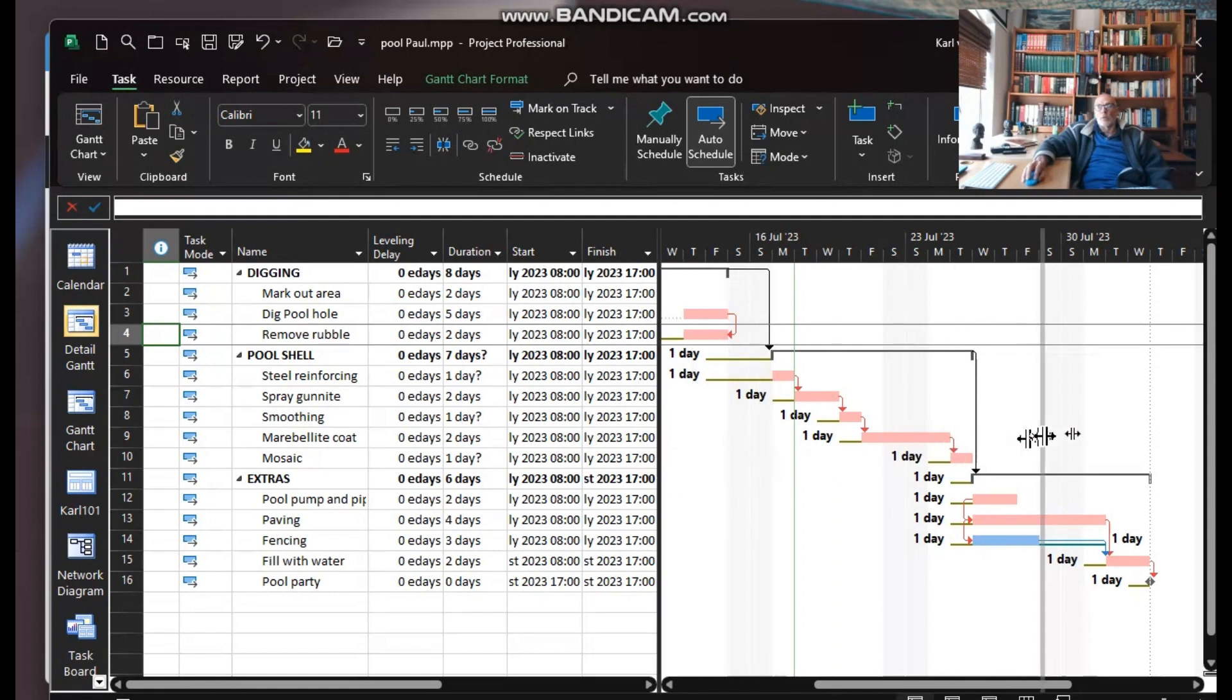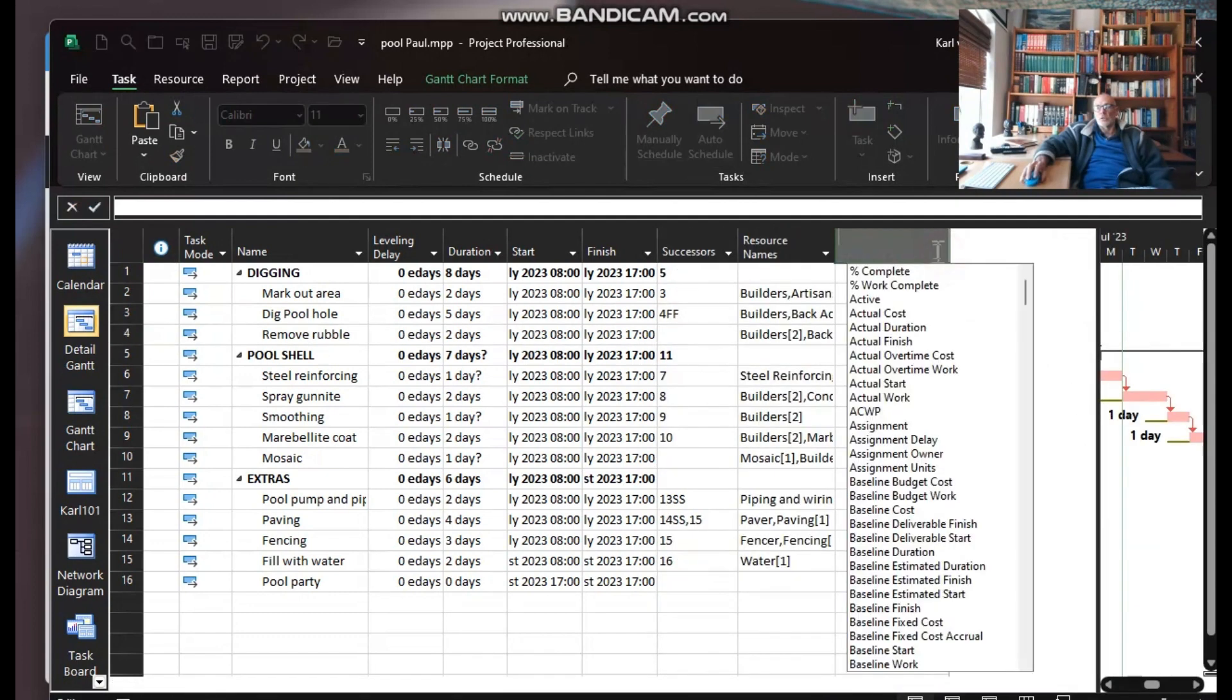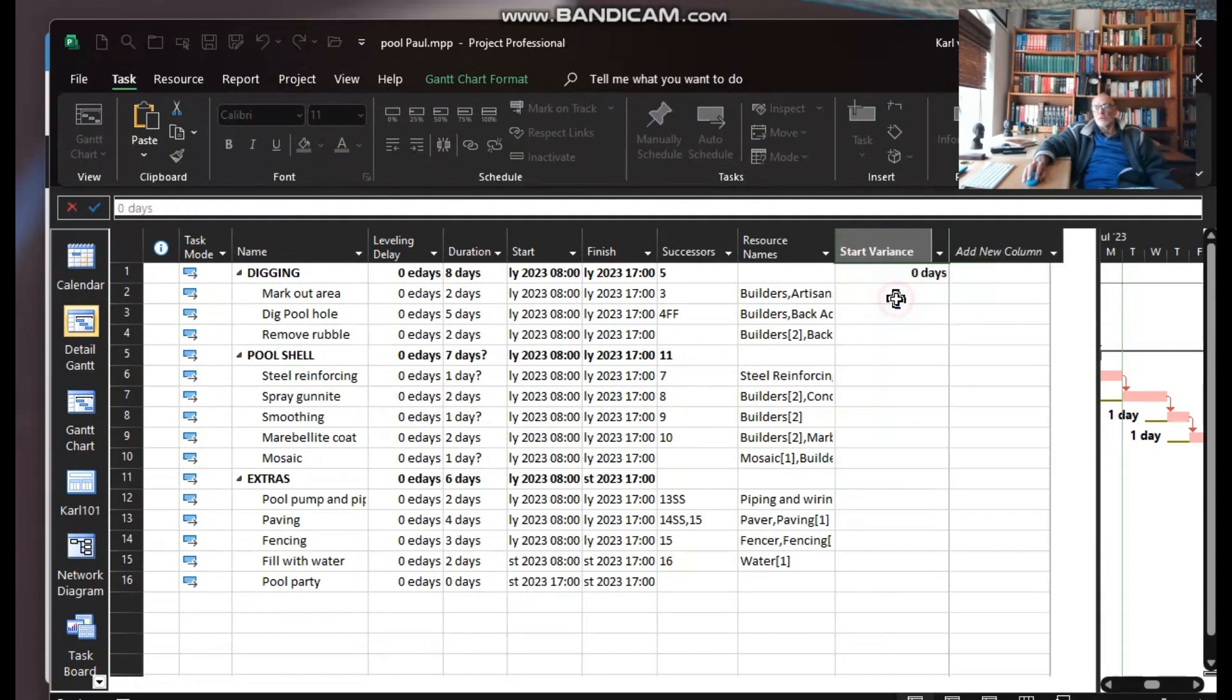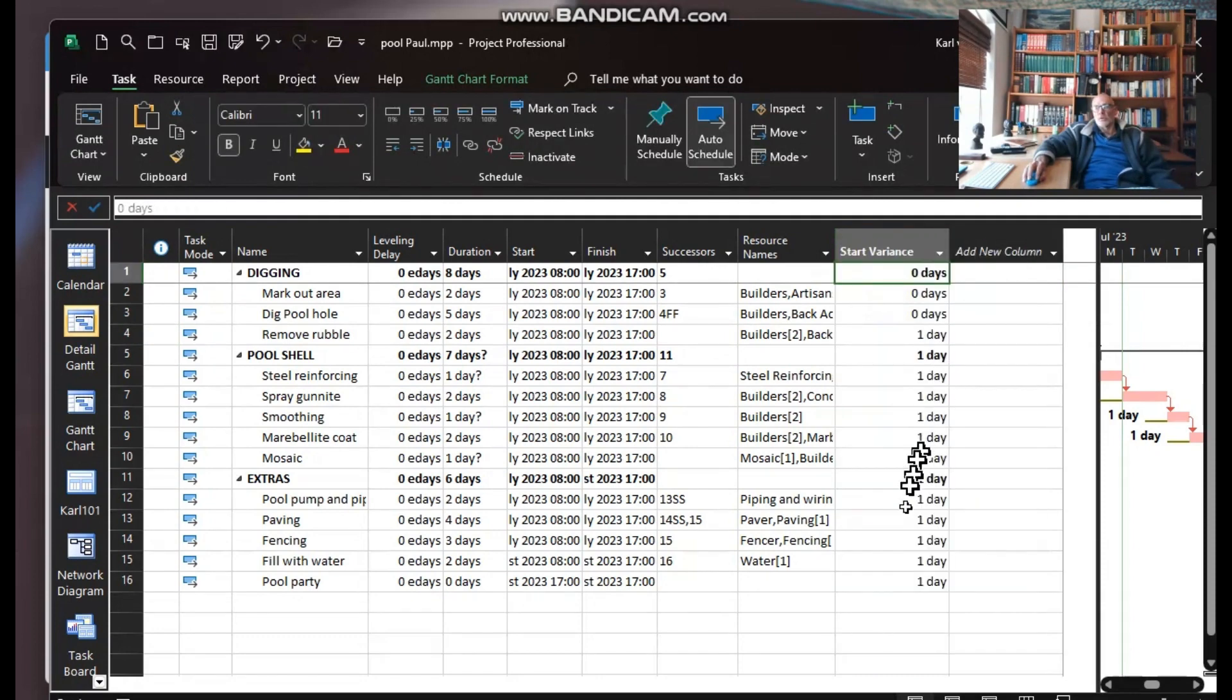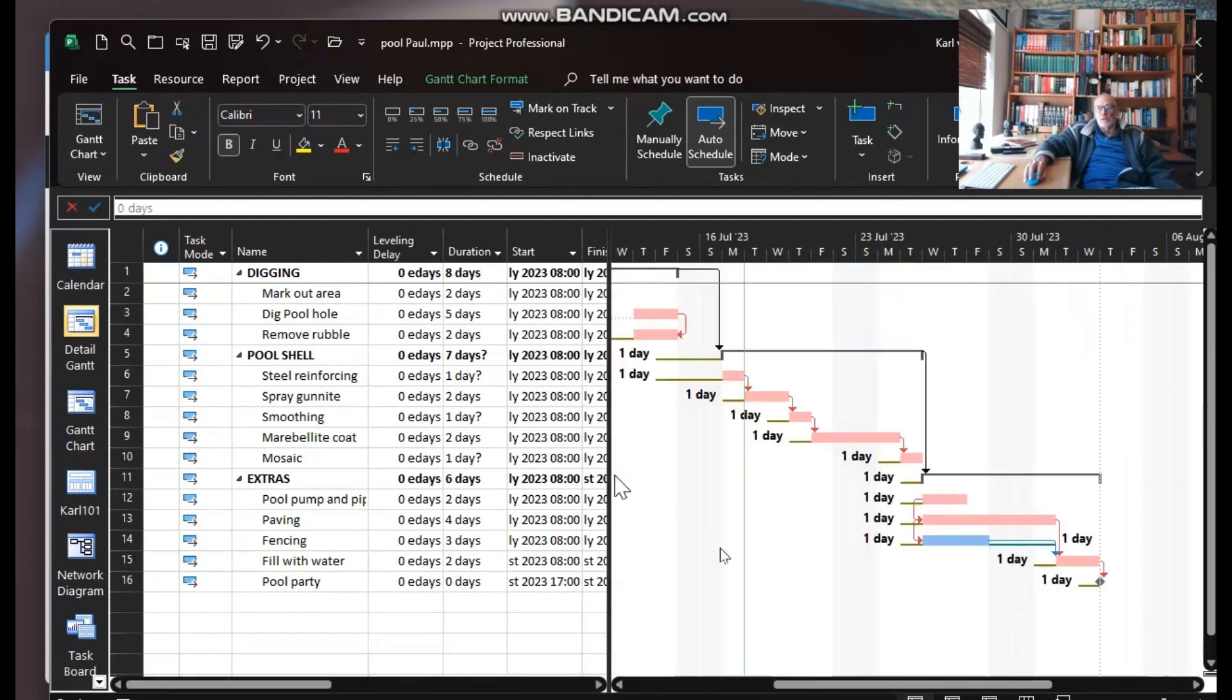However, if one wants to see that in a column, you would just need to choose start variance, and start variance will give you your slippage over there. So there I have my slippage off the baseline. No need to add a special customized column.